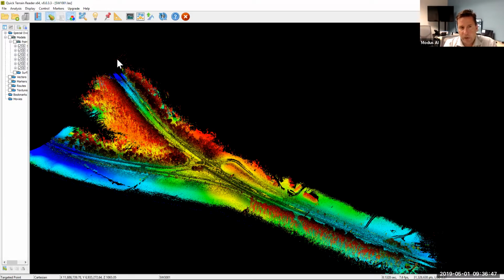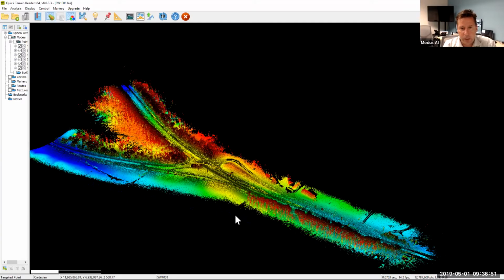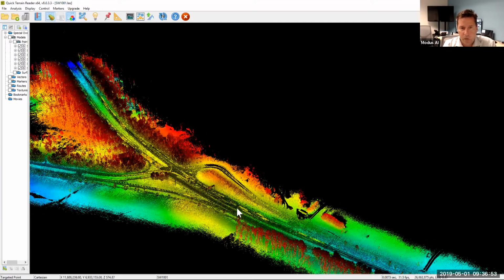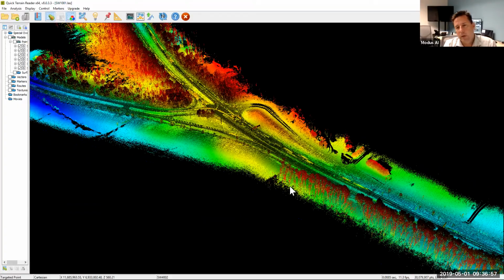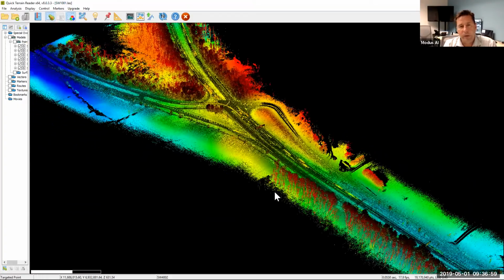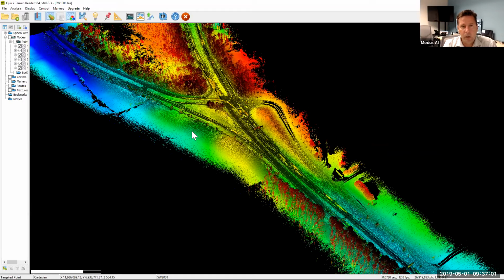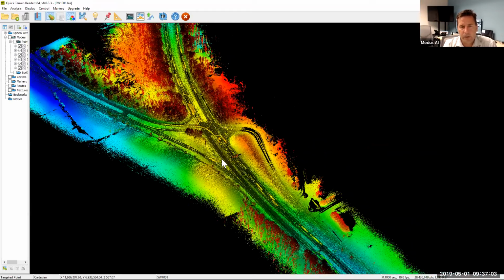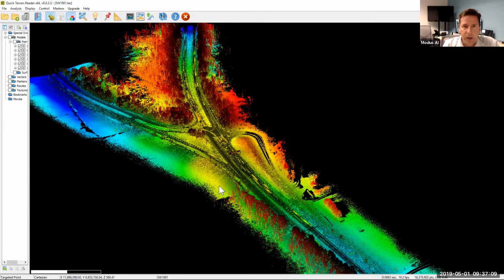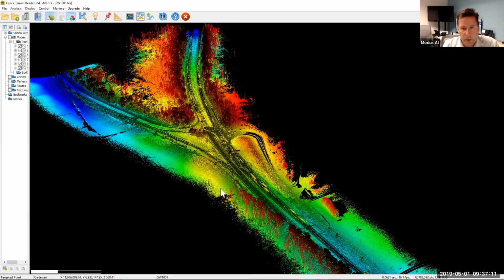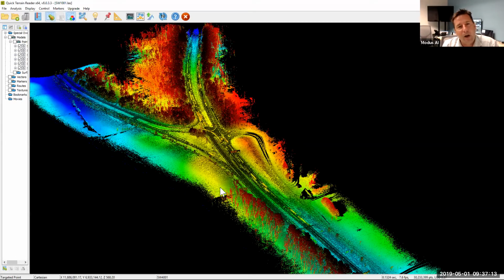For this project, even though it took us maybe 30 minutes to do the actual acquisition, it took us 2 hours to find the survey points. And then it took us a week after to work with the surveying team to figure out what datum, what grid, so that we were all referenced correctly. And on delivery, we were actually on the wrong reference from what they wanted. So they were asking why we were a foot off.